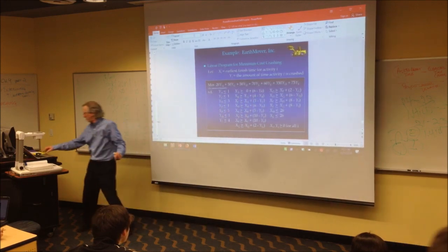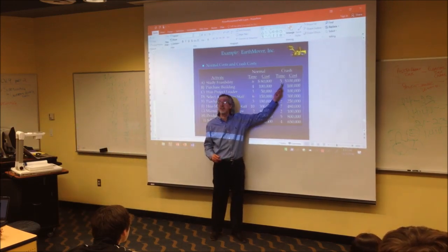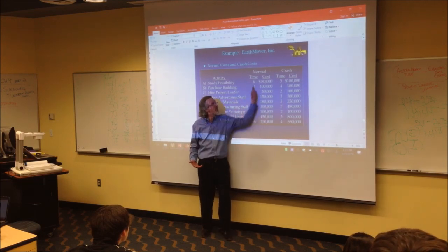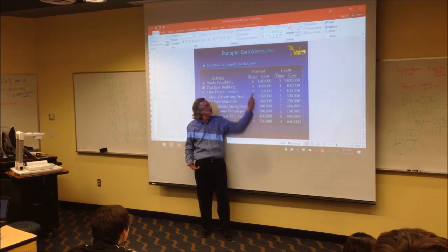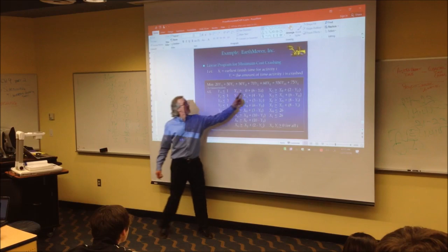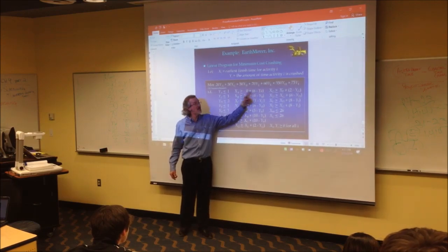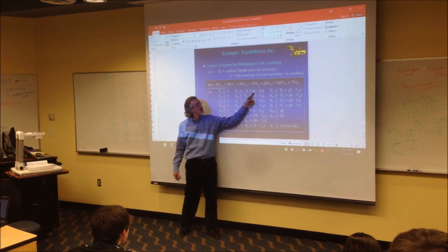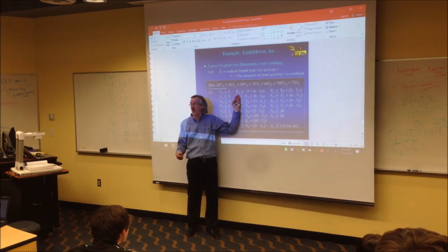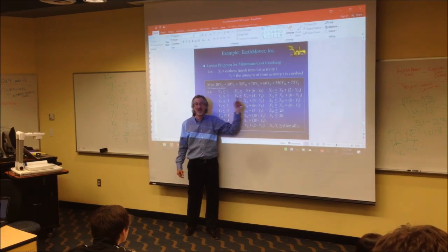So look at A at the 2 different times we have up here. This is normal time. This is the time if we were to crash it by 1 unit. The normal time is the number you use for these X constraints. Then the X variable for the preceding activity, plus, in parentheses, the normal time for the activity you're writing this for, minus the Y variable for the activity you're writing this for. So this A and that A should always match. B, B, C, C. Get it? I want to repeat it one time.